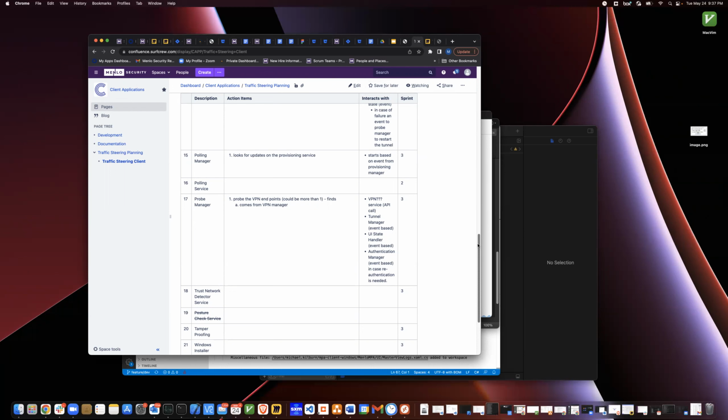So at the very high level, we have all the epics, everything we're going to need, and what sprint they're going to be done in. Then, as we go along, or as soon as possible, we start creating user stories for those epics and put them all in the backlog, groom them, so that we always have a whole bunch of stories in the backlog ready to go, groomed for the next sprint.